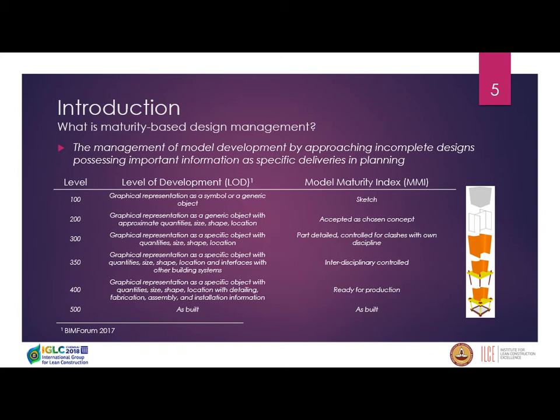And this is a problem when approaching design because, from the development of an initial sketch towards the production-ready model, there is a lot of interchange of information between models and designers, which is exactly the iterative and reciprocal nature of design that we are trying to find a way to describe. Maturity-based design management potentially solves this by specifying different levels where the partially complete models possess important pieces of information that are relevant